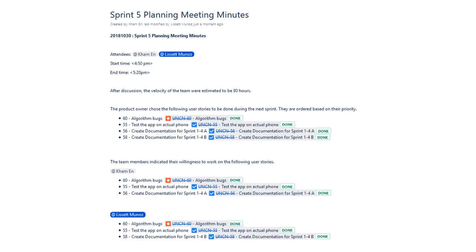During this discussion we determined that the velocity of the team would be about 80 hours. We decided that we would fix the algorithm bugs, test the application on an actual phone, and finish creating the documentation for Sprint 1 through 4 since we hadn't completed Sprint 4's at this point since we just finished it.